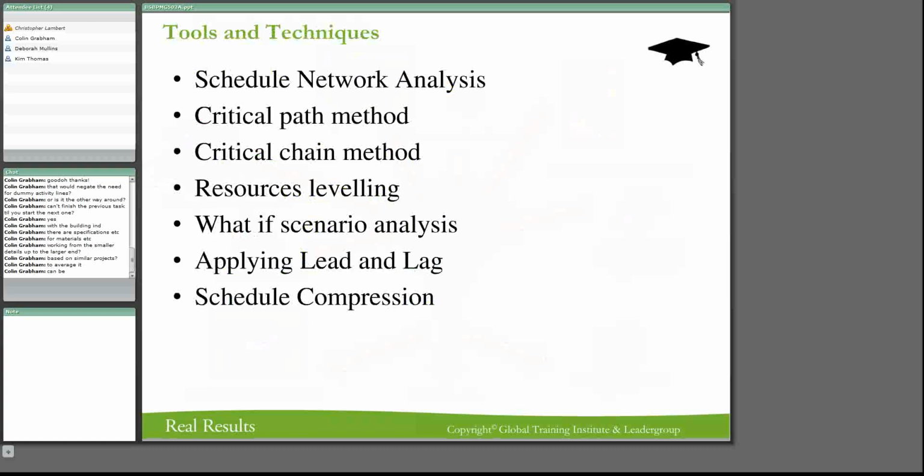The critical path is the path where there is no buffering. One activity after the other has to take place, and there's no slack between any of the activities. That's what we're trying to do, and that's why the network analysis is so important, and the network tools are so important for project management, because that is going to find your critical path. Now, what is the difference between a critical path method and a critical chain method?